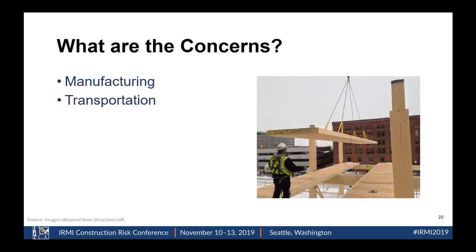We're located in the central part of the United States. We actually bought our mass timber from Austria, and it was shipped over. It was for a 200,000 square foot building. We had about a $5 million supply contract coming from Austria, and the next closest bid was 6, and it was located in Vancouver, British Columbia.